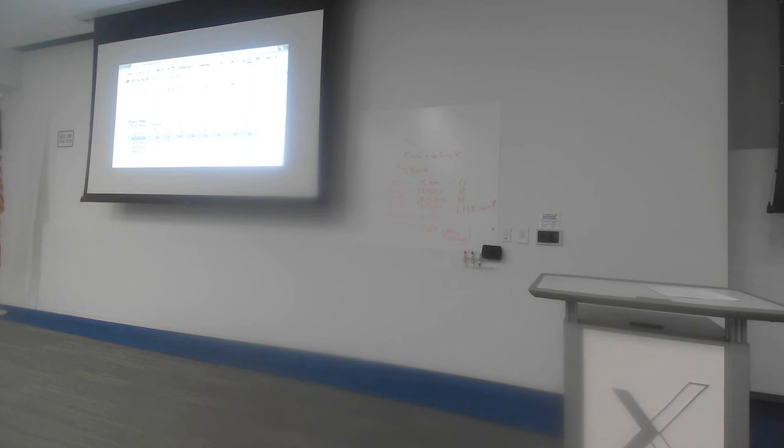And so if I were to go any further, I would again have to apply the same logic, but make sure that each of those three different critical paths were being brought back together. Otherwise, the overall project duration wouldn't be changing. But it doesn't matter in terms of this question, because essentially we've got what we were looking for, which is we've got a low point here.